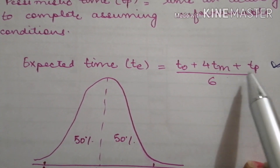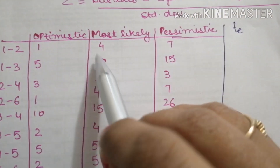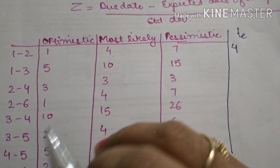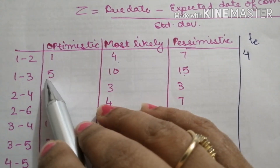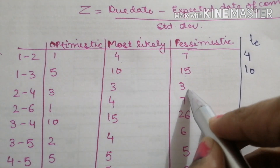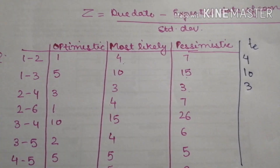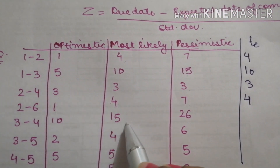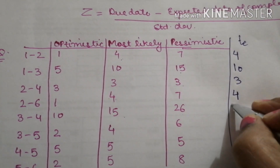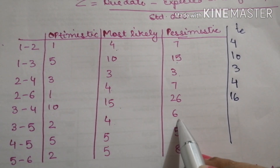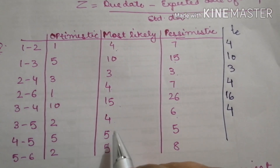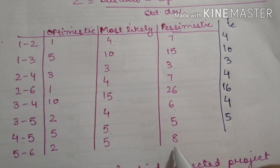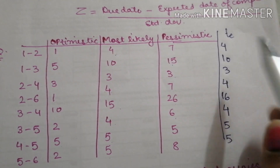Using the formula TO plus 4TM plus TP divided by 6, we calculate expected times for each activity. For activity 1-2: 4 into 4 is 16, plus 7 is 23, plus 1 is 24, divided by 6 equals 4. For 1-3: 4 into 3 is 12, plus 3 is 15, plus 3 is 18, divided by 6 equals 3. For 2-4: 24 divided by 6 equals 4. For 3-4: 15 into 4 is 60, giving 96 divided by 6 equals 16. For 2-6: 24 divided by 6 equals 4. For 3-5: 30 divided by 6 equals 5. For 4-5 and 5-6: 30 divided by 6 equals 5 each. We have now calculated all the expected time periods.